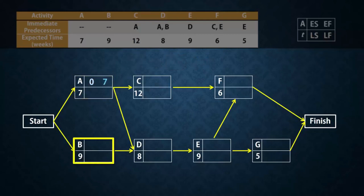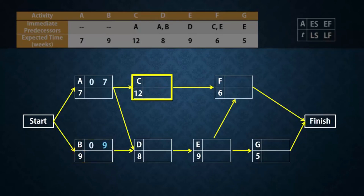B also has an earliest start time of 0, and with an activity time of 9, it will have an earliest finish time of 9. Now C needs A to be completed before it can start. Since the earliest finish time for A is 7, then the earliest time C can start is 7. And with an activity time of 12 weeks, C will have an earliest finish time of 12 plus 7, which gives 19.